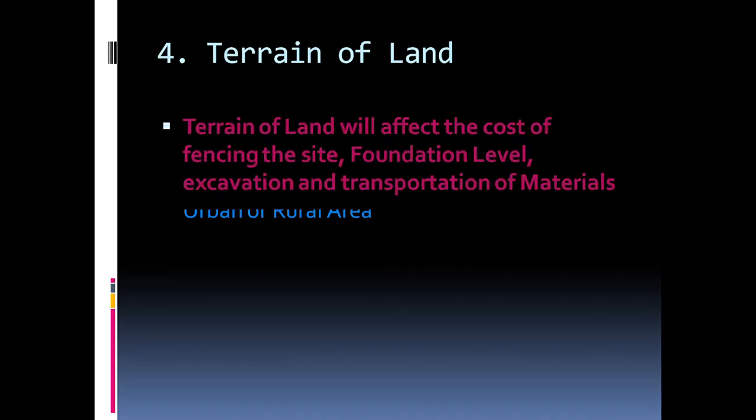Next, we have terrain of land. Assuming you are building your house in a hilly area and another person is building on a flat area, probably the person building on a flat area will use very little money in terms of excavation and also in leveling the foundation to the slab level. So those are not the only factors, but the few factors that determine the cost of